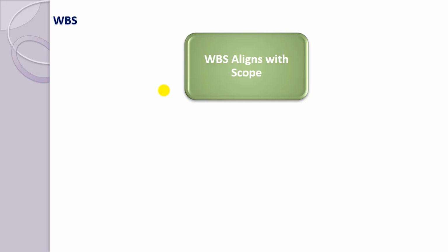If it is a small project, you won't go into detail. We will use a different template of WBS. And if it is a huge project, it all depends on what processes you are following. It comprises a tree structure that hierarchically represents the project and its component deliverables. A WBS should include 100% of the scope because it helps you with tracking. And literally everything written in the WBS has to be delivered to the client. It is shared with the customers.